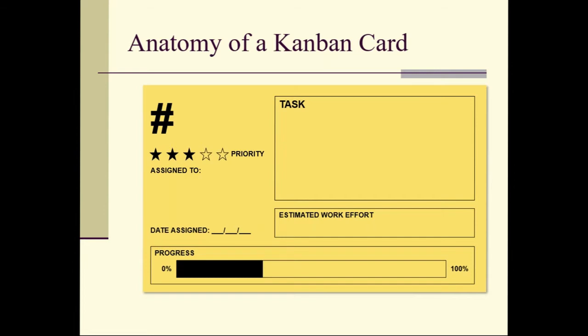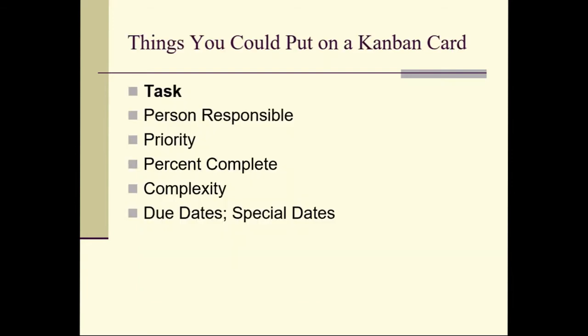So somebody would just replace the hours remaining on that bottom row and change it to how many proper hours are left on the Kanban card. That's another way that it's commonly implemented, is us estimating or updating the number of hours remaining. So there's an example of a Kanban card. There's many different formats, different fields that people put on it. This is just one common representation.